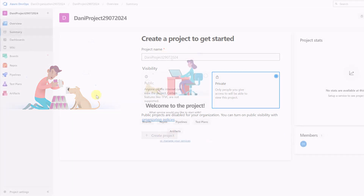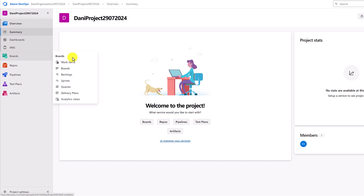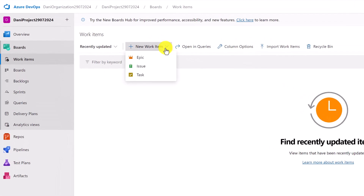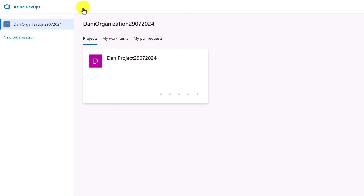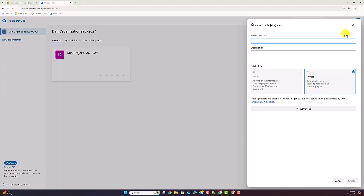Within your created project, if you go to Work Items and try to create a new work item, you'll see there are only three types of work items. This is usually a limitation because I like to have additional work item types like epics, features, user stories, and so forth. When you create a new project for a completely new organization it uses those limited work item types by default. What I recommend is going back to your organization and creating a new project from there.